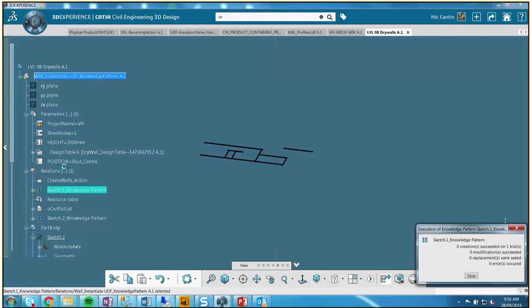So then the next iteration, which we're now trying to do, is say, okay, can we have all the lines on an entire floor that are associated automatically to the wall schedule, and then all the geometry gets created at once. And this is kind of an iterative process. We still have to flesh out a few things like with the door and stuff like that. But generally, this is where we're trying to head with this. And the use case for us is we've got to locate canning for an entire tower in a very short period of time with walls and be able to help the drywall contractor. We don't have the time to do it manually. We have to find a way to automate.